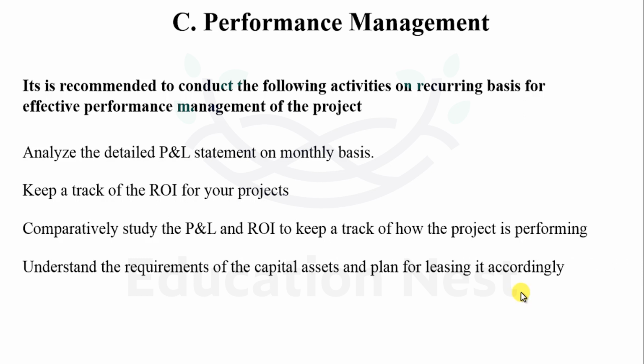Understand the requirement of the capital asset and plan for its leasing accordingly. Now, based on the previous session, where we understood the entire capex versus opex scenario, buying versus leasing: if your project requires a substantial amount to be invested in a fixed asset, you need to determine what period of time you want that asset to complete your project, and based on that, you make the analysis. Is it better to buy the asset with the resources, or is it better to lease the asset? And accordingly, time is the biggest factor over there.